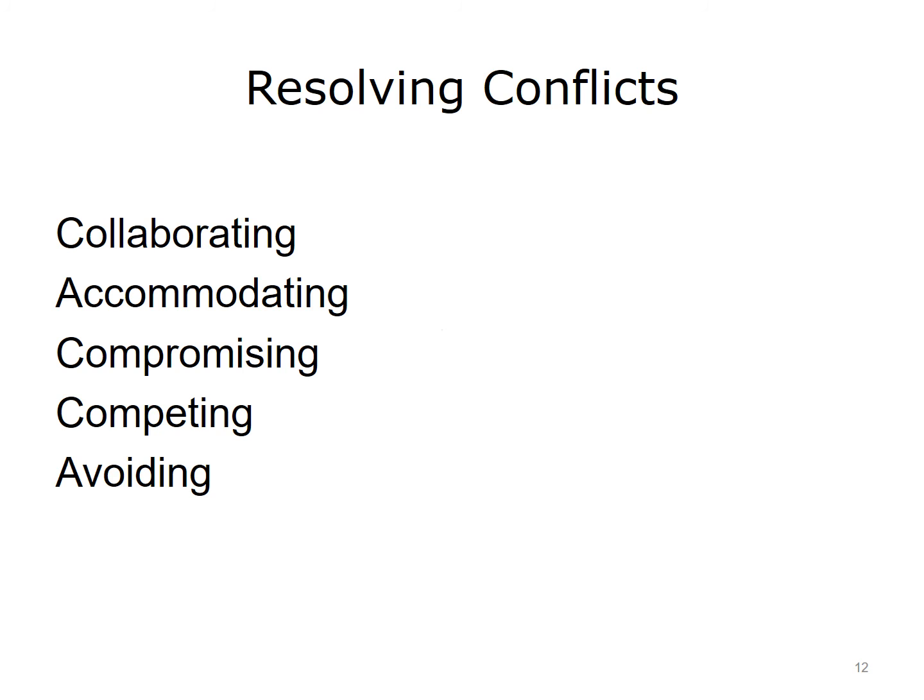Finally, you may decide to use avoidance strategies, such as retreating, circumventing, or delaying an issue, if the current time or place is not appropriate for resolving the conflict directly. Avoidance may be your best option when the issue is not critical, relationships are more important than the outcome, tempers are rising, other problems need to be addressed, losing is inevitable, you are emotionally invested, others are better suited to fight the battle, or you simply need more information. It is important to understand that postponing conflict sometimes can make matters worse.